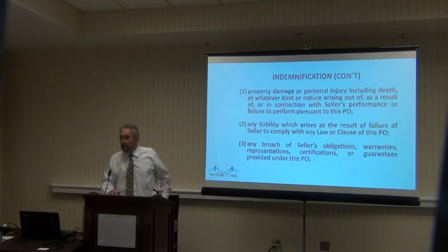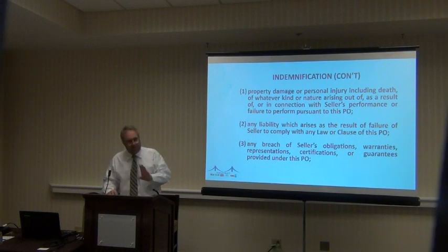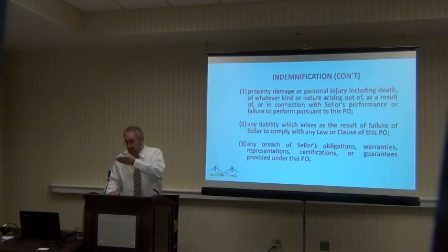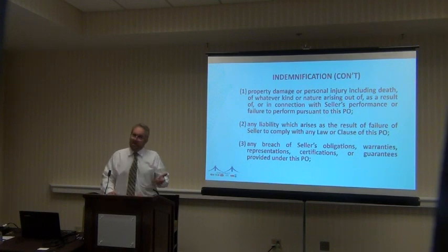Let's start out with the premise that, to me, insurance and indemnity go hand in hand. If you indemnify somebody for something, you want, if at all possible, your insurance policy in place, whether it's yours as the named insured or primary insured, or additional insured status. Either way, you want the insurance to respond, correct? You want the insurance to step up. It isn't my money, it's the insurance company's money, but at least we've got it in place. The indemnity's there, and so is the insurance.